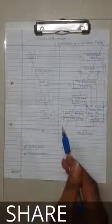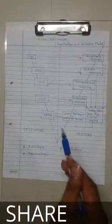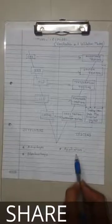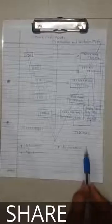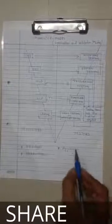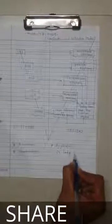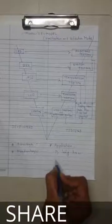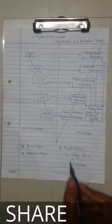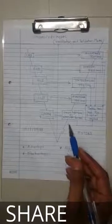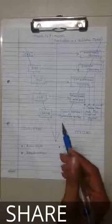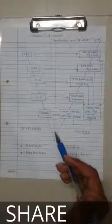The drawbacks of the V&V model are: initial investment is more because the testing team is needed from the very beginning, and there is more documentation work due to test plans, test cases, and other documents. The V&V model is applied for long-term projects and for complex applications.